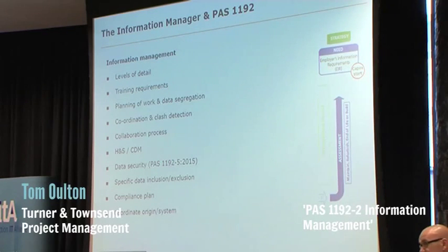Coordinate and origin system. This is massively important because people can go off doing their own models, but they can be located in completely different places, so that when you need to bring them together for your coordination and your clash detection, you've got one built on the site, one 20 metres up, one 3 miles away. That's no use. So, that needs to be adhered to. And the software schedule, who's going to design what, which model's designed in what software.